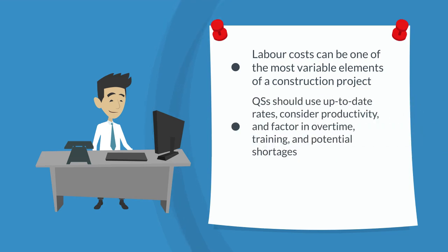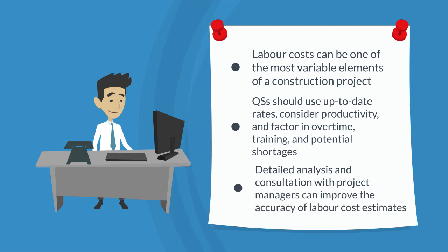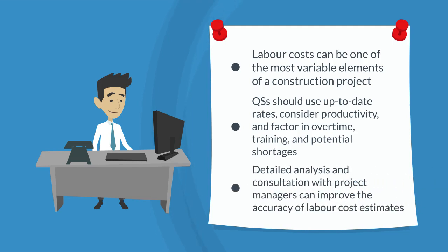QSs should use up-to-date labour rates, consider productivity rates and factor in overtime, training and potential labour shortages. Detailed analysis and consultation with project managers can improve the accuracy of labour cost estimates.